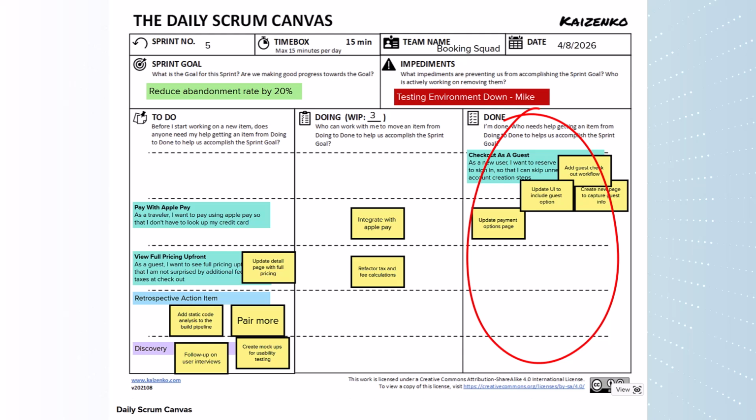And that's the Daily Scrum, a quick event for the developers to review their progress towards the sprint goal, adjust the sprint plan, and update the sprint backlog based on their progress. Right after the Daily Scrum, it's a great time for a few team members to have ad hoc meetings and discuss any remaining issues or things that need clarification.